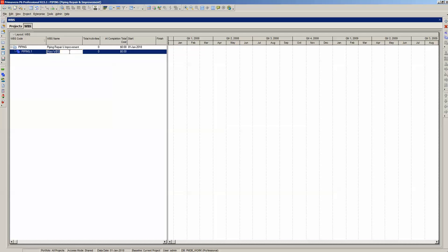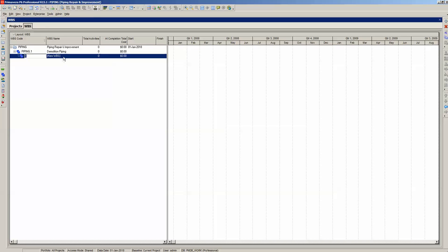Instead, select New WBS in the WBS name column and type in the appropriate WBS element name, which is Demolition Piping. Next, we add another WBS element named Installation Piping. Note that every time we add a new WBS element, it creates a child of the highlighted WBS element. This worked well for Demolition Piping because we want it to be a child of piping.